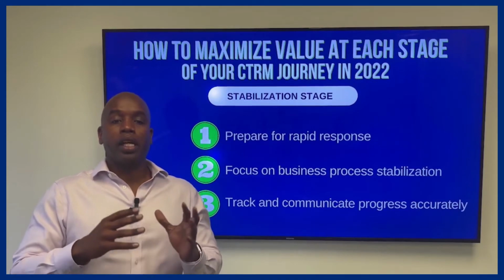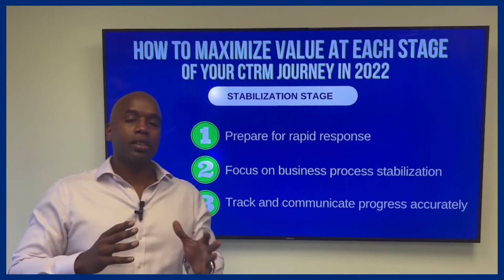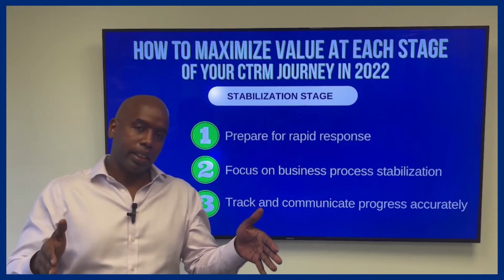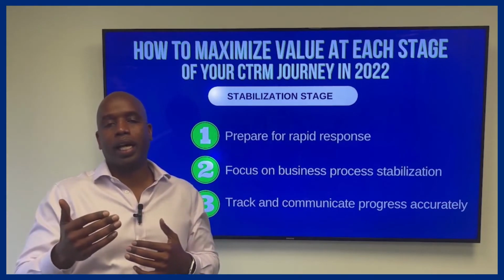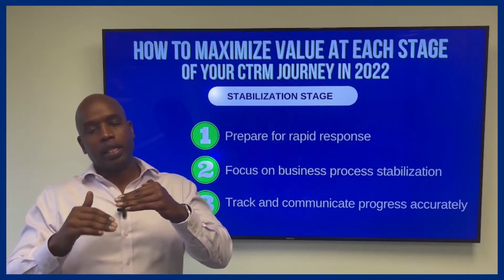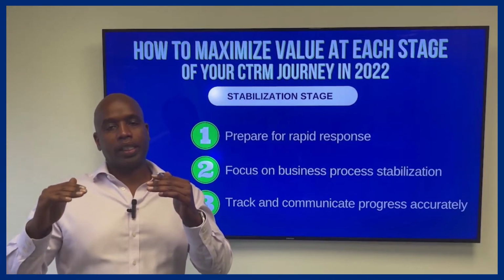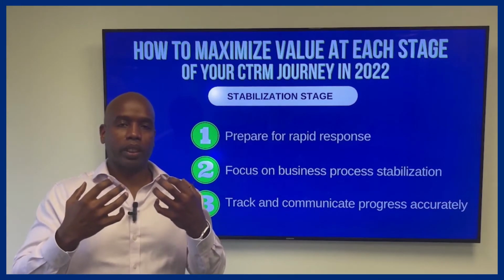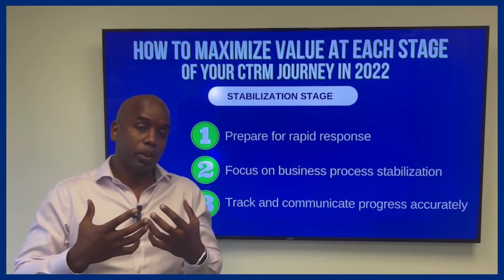The third tip is to track and communicate progress regularly. As this is going on, it's going to be hectic. This is going on over here, this is going on over here. But people can see that progress is being made. We logged 10 issues and we closed 9. The next day we might log 8 and close 7. As long as people can see a trend, they can say, okay, this is getting better, things are functioning exactly as we expect, and the solution is working as designed. That helps to bring down anxiety, if there is any. Hopefully there's not, but there is always some level when we talk about change.